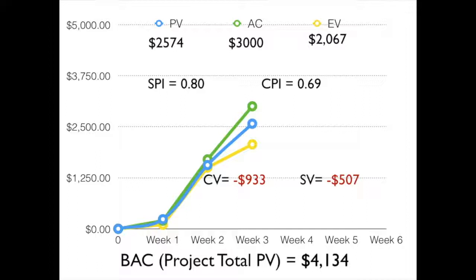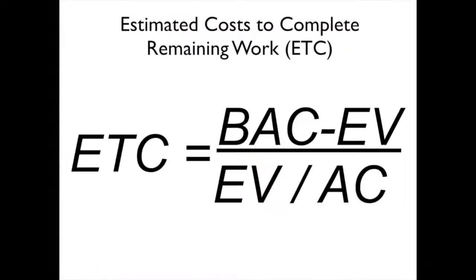If we want to project this out and figure out what might be our final costs of our project, what we're really going to do is take our current CPI and make a calculation to determine if our current CPI holds, what is it going to cost to do the work that we have left to do — what we might call remaining work. So the estimated cost to complete the remaining work, or ETC,